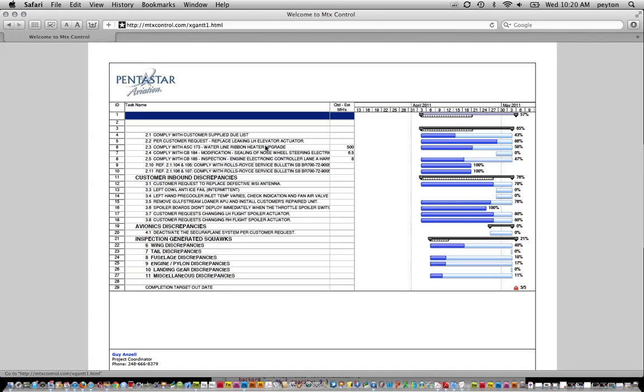So this many man hours have been applied to it today. We divide that into the total work scope or the item for what it was quoted for, and that gives us our projected number and also our percentage bar.